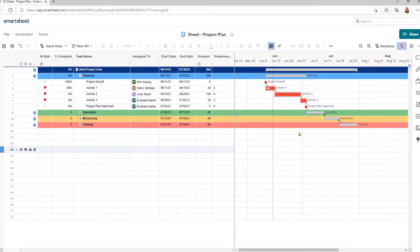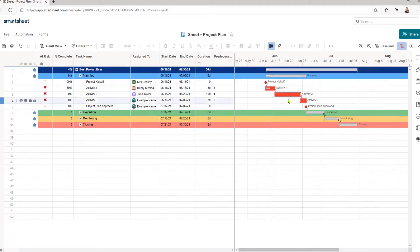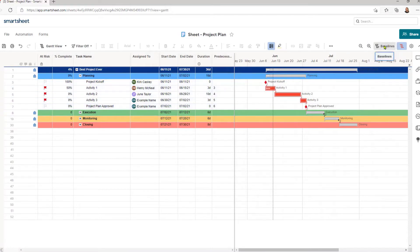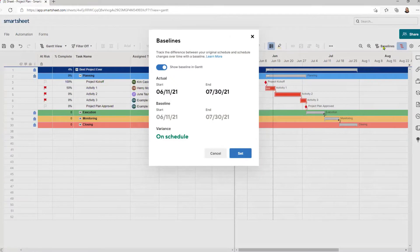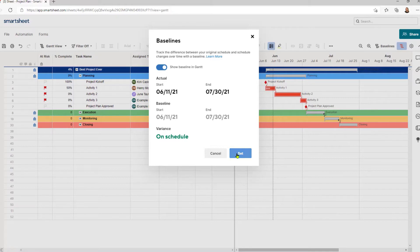You will see that some of them are bright red — that's my critical path. Smartsheet has critical path; you can turn it on and off, and it puts a red line around the tasks that are on the critical path. You will now see where baselines is right next to that critical path. So right here it says baselines, and I'm going to click on that. I have right now 'show baselines in Gantt.' I'm currently showing my start date and end dates. It's currently showing that I am on track, and I'm going to set it.